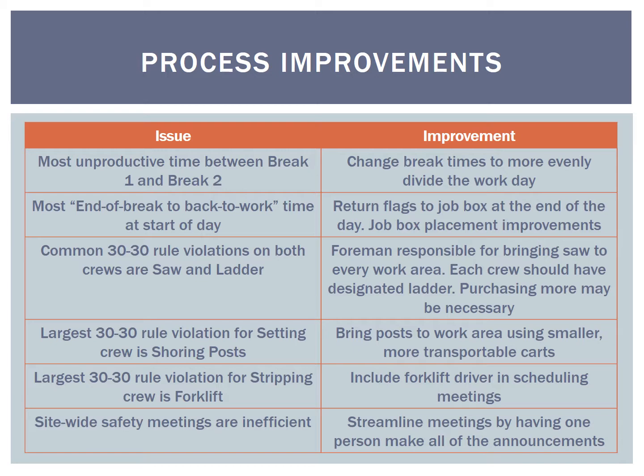To address the issues the stripping crew had with the forklift, the driver could be included in the scheduling meetings to help smooth demand. Finally, the previously mentioned site-wide safety meetings could be made more effective if the information was compiled ahead of time and announced by one person instead of going around to many different speakers throughout the meeting.